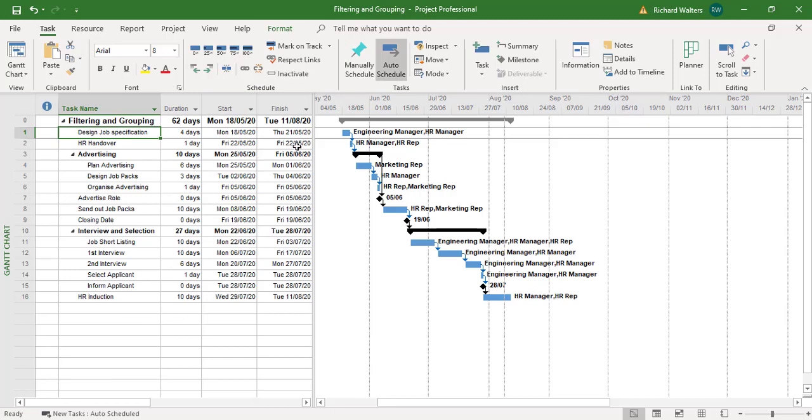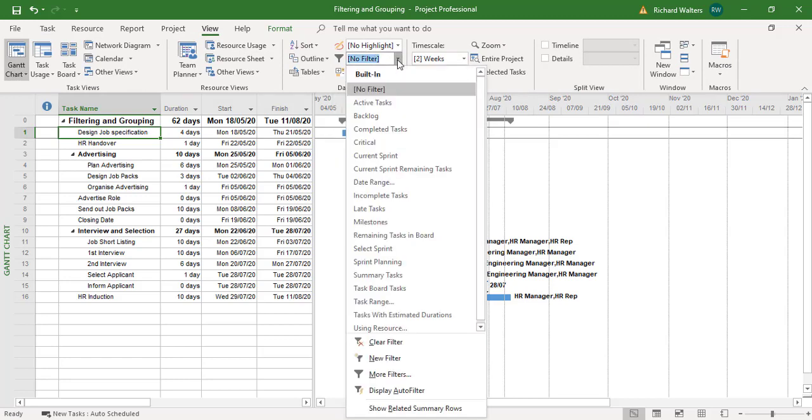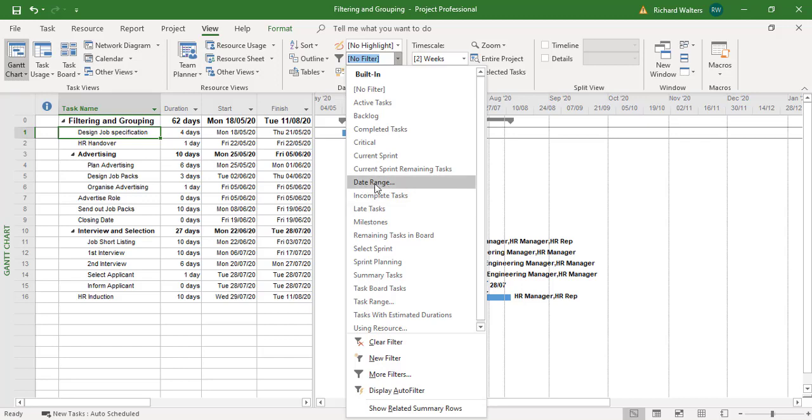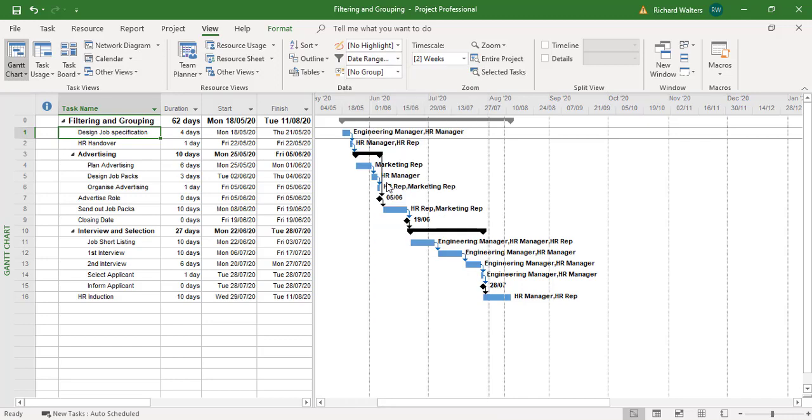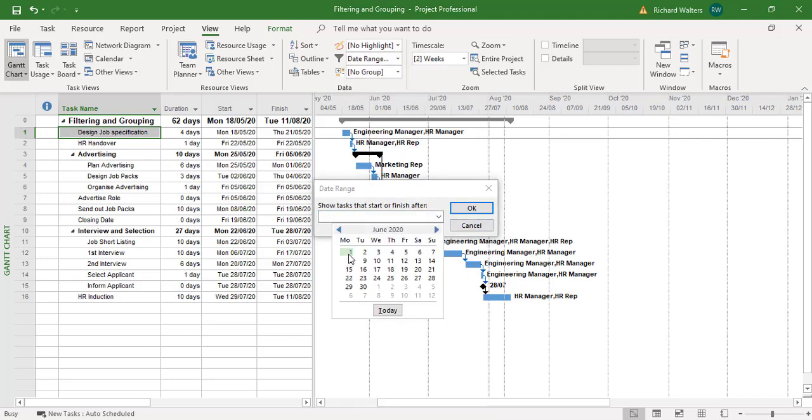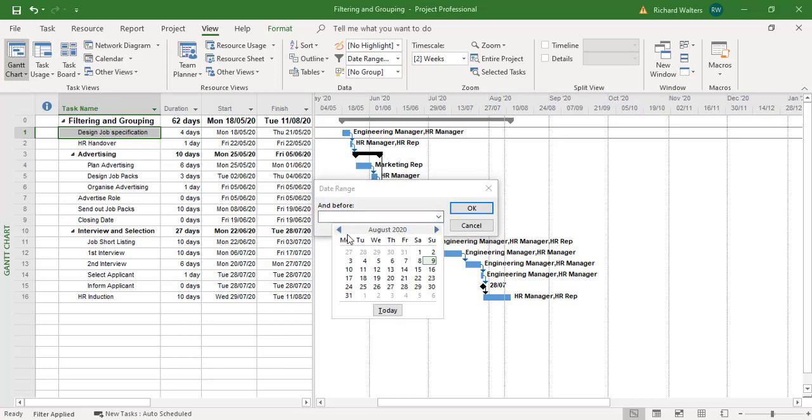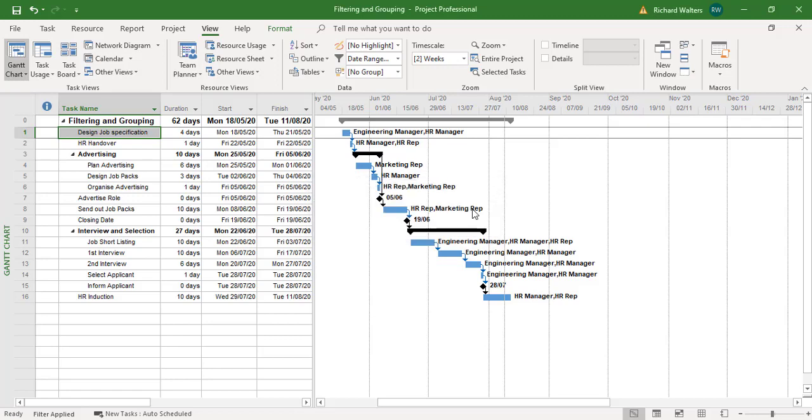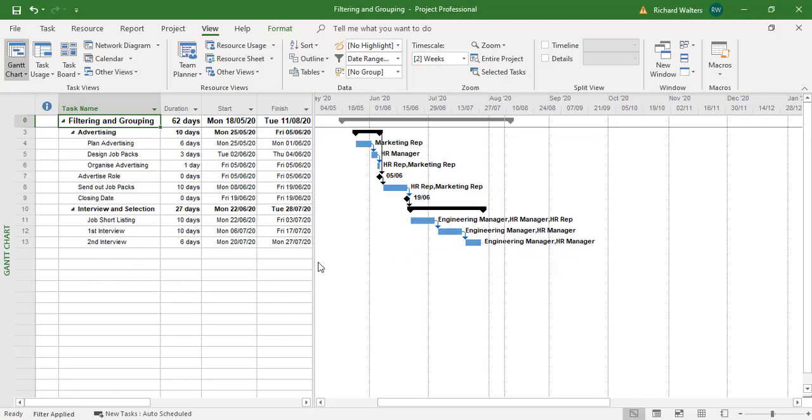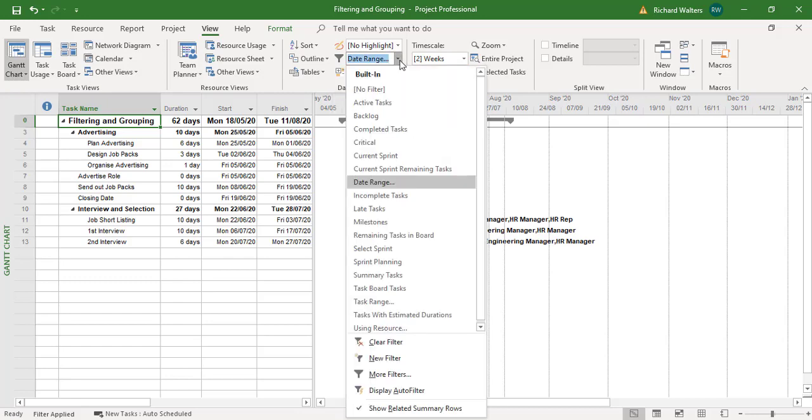Now under the view tab, you can also filter through the filter area where we've got no filter. So I could filter using resource. For example, date range. So whereas I use the start before as a start, I could give it a date range. So I could say start or finish, go to the 1st of June. Okay. And before, I'm going to go to the 20th of July. And there's the selection for that. Then go to the filter and clear it.